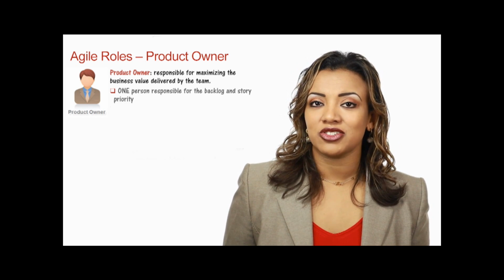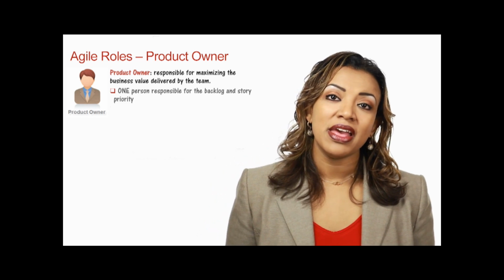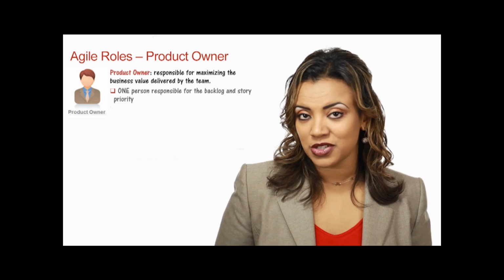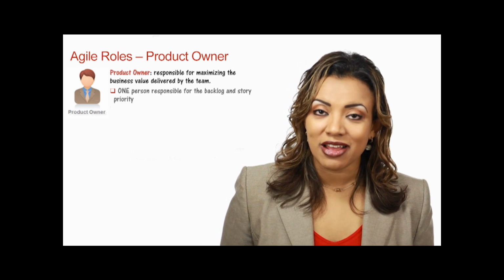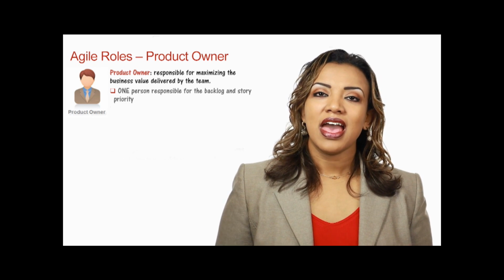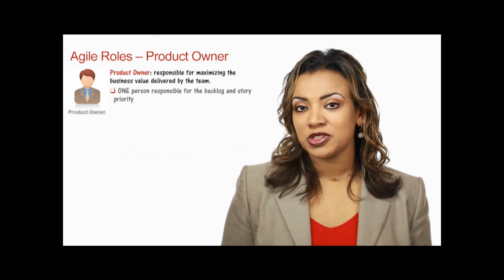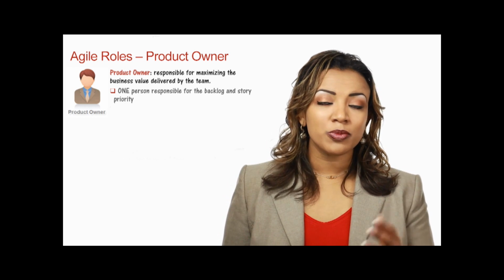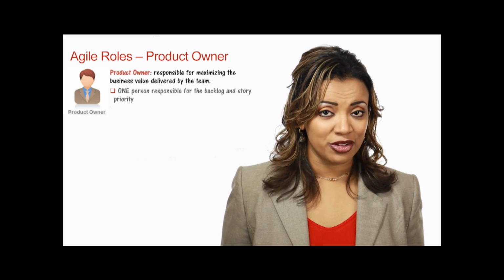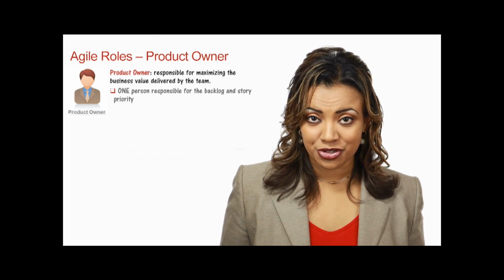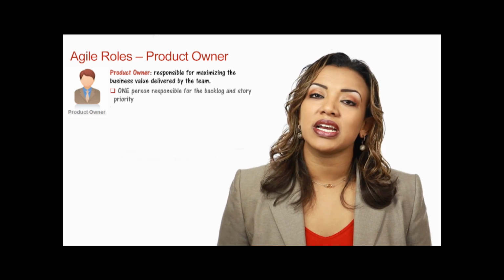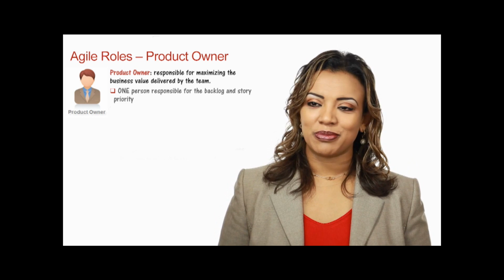And I know this is challenging because we are used to, as a team, having multiple stakeholders, multiple business people that we get requirements from. But as you know, that hasn't worked out very well because the team then has multiple bosses, multiple people to please, and everyone ends up not being happy. So this product owner is one person responsible for collecting all the information from the stakeholders, that's what we call stakeholder management, and presenting it in one prioritized list for this team to actually accomplish.